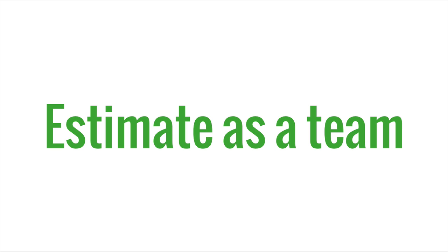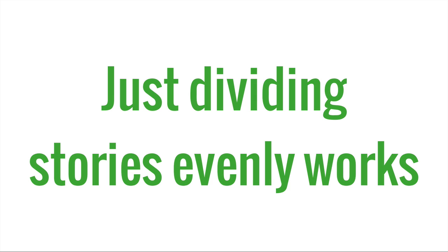You also want to estimate as a team when you can. Often somebody will have an insight on some complexity in the problem that other people won't have, and you need to take that seriously. It's usually fine to take the highest estimate out of a group of people, but however you want to do that, consensus or highest often work pretty well. But you can get pretty far just by dividing stories evenly. That's going to get you a lot of the way there if you just get an instinct of how to divide stories into relatively even chunks. That's what I have to say about estimation.